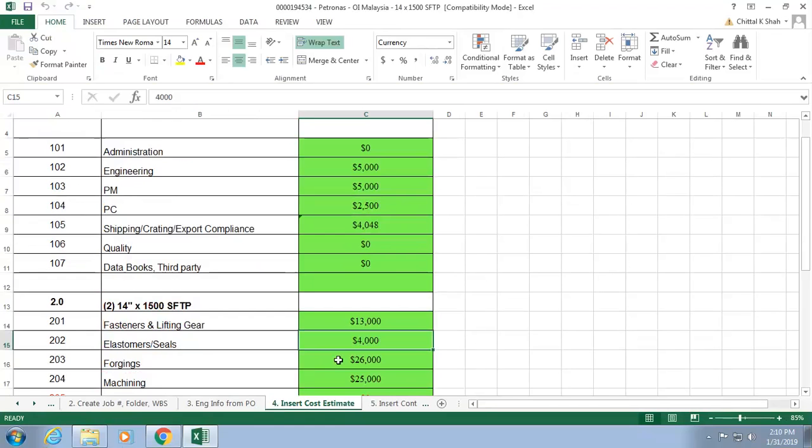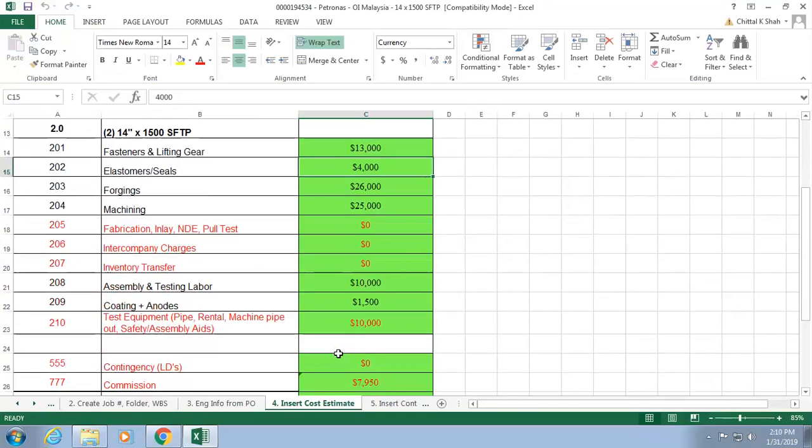But what they do is, it's very hard to manage a project when you just put a lump sum, right? So when you have a lump sum, let's say I have $200,000 to use on a $300,000 price of the project. If I don't have the buckets spread out, I won't know where my expenditures are going, where I'm going over, where I'm going under, what's not working, what's working. So it's very important to do this work breakdown structure, and you make buckets of the major items you're going to be dealing with.